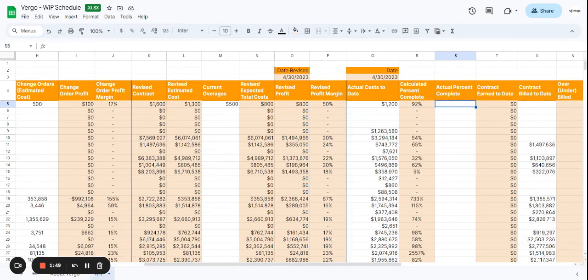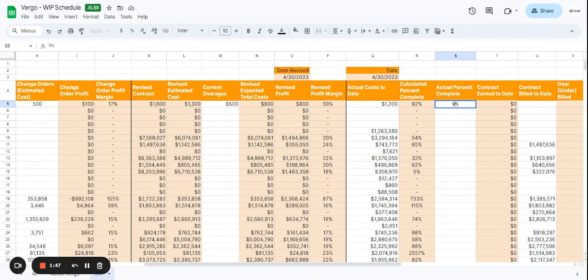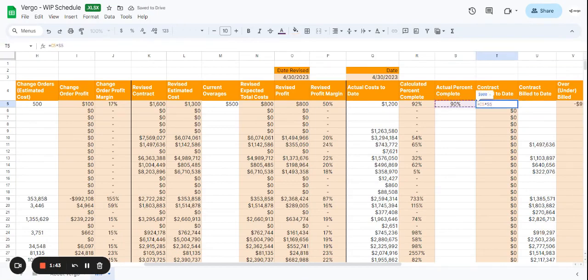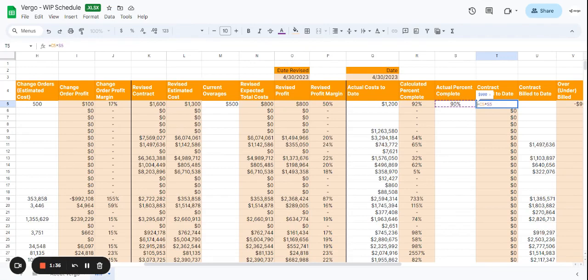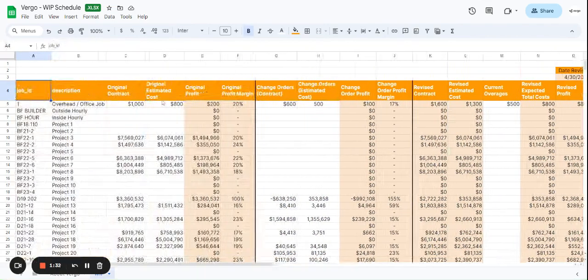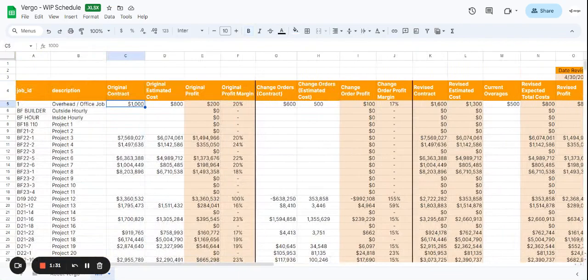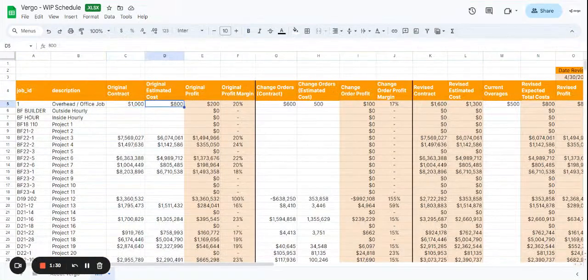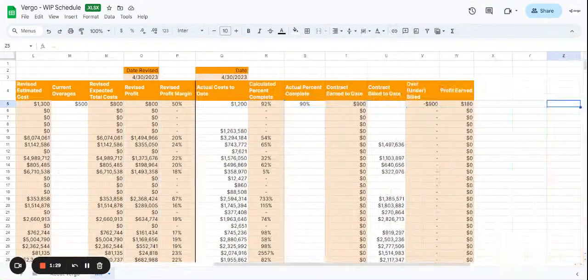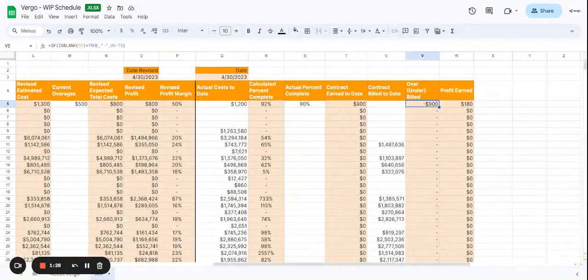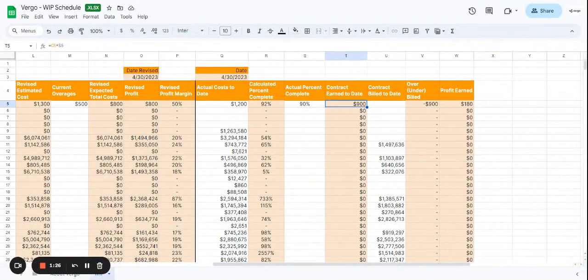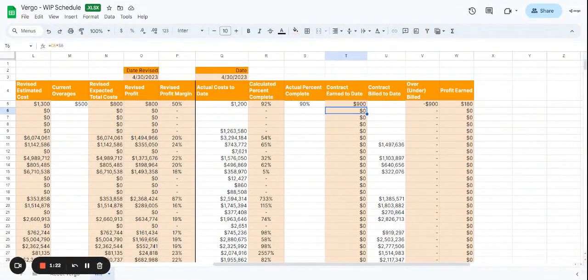Actual percent completed, let's say we've actually have 90% completed. Then we have the contract earned to date, which is going to calculate the actual percent that's completed times the original contract amount. That will give us the contract earned to date based on the percent completed and the original contract amount.